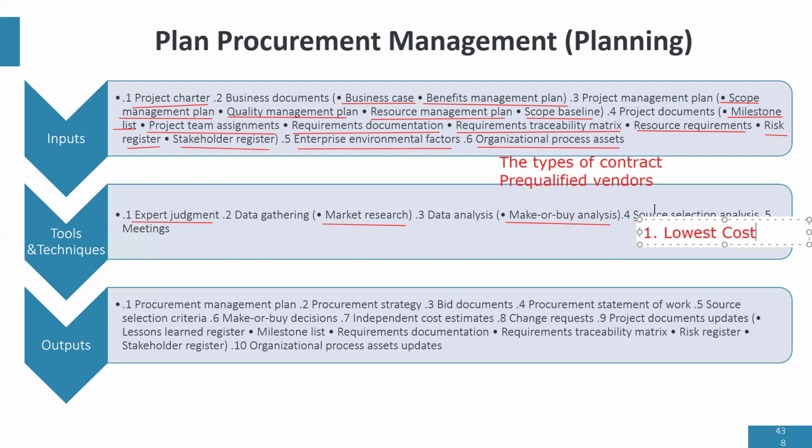It means that we're going to choose the vendor that is the cheapest. Now, this is not always the best strategy. Some people feel that the cheapest vendor is always the best. Not necessarily. Now, if the job you want to outsource is something common and routine, which means it's a simple job and has a low degree of customization, right?